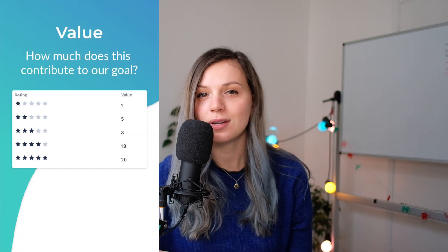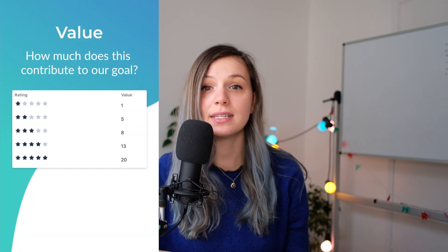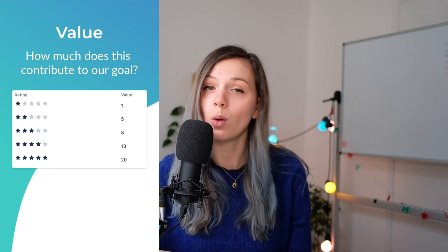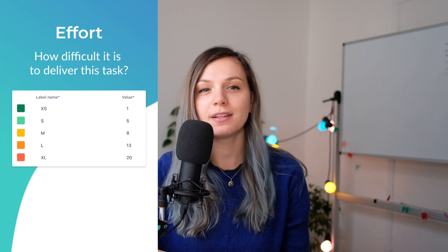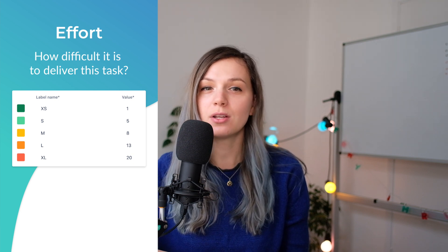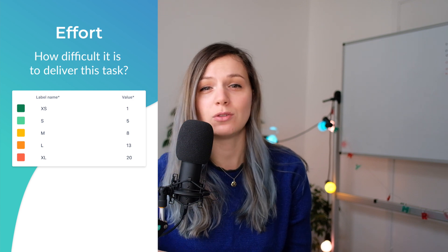To assign the value metric, ask yourself: how does this contribute to our goal? Assign values from low to high. To fill the effort metric, ask how difficult it is to deliver the task. You can use t-shirt sizes for estimation — teams are usually much more comfortable with them because they don't need to commit to any specific time frame.